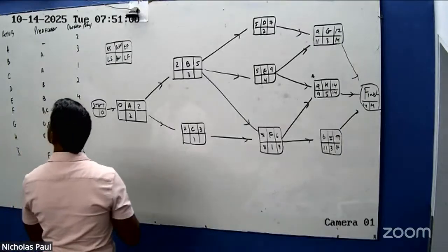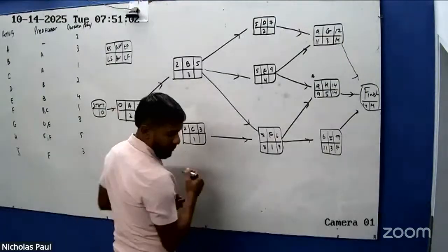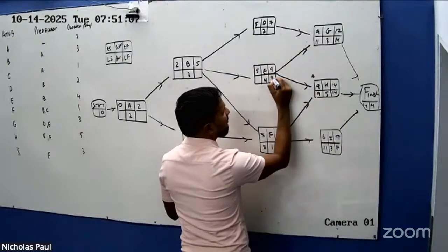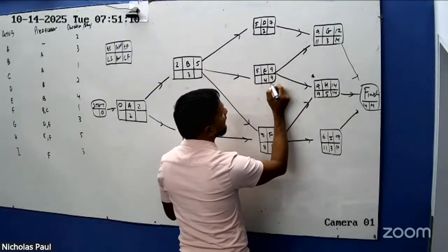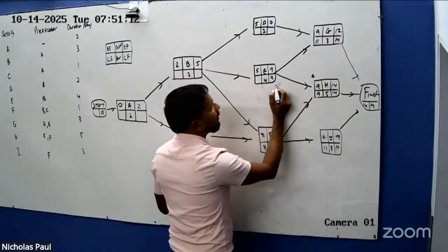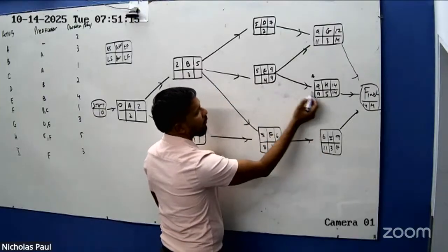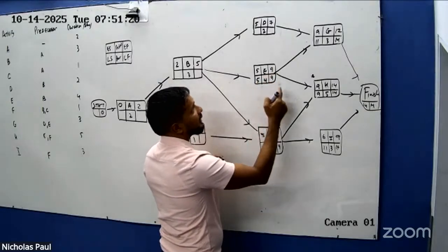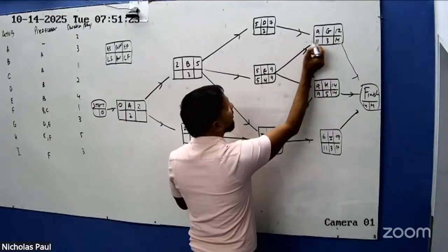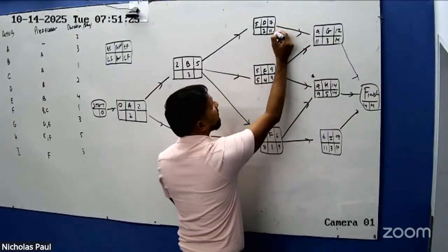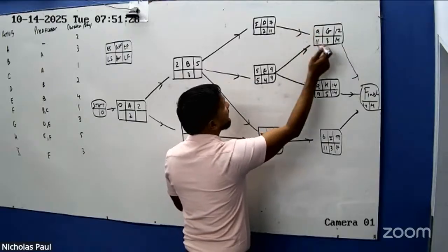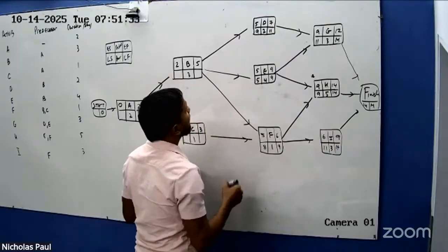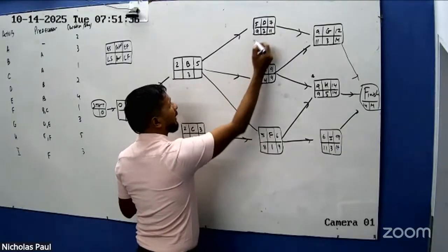Let's go here again. So this is 9 and 11. So I have to take 9, right? Because H can't finish on the 11, right? So 9, yeah, take the smaller one, 9 here. 9 minus 5 is 4. These two are the same, no wiggle time. So you know that there is no play there, right? 11. So I could finish this on the 11 and still be good because this has 3 to finish, right? 11 minus 2 is 9. Right? What am I doing here now? Who to choose for?